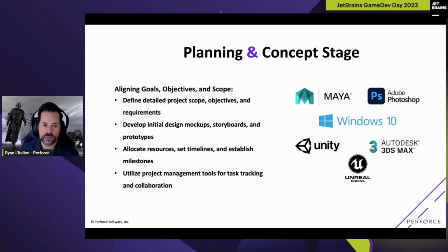planning style. The usual software development tool becomes Atlassian's Jira or Monday or Hansoft, which also has its pros and cons. In the game development pipeline, it's traditionally a waterfall style, where the game design document, the GDD, is referenced continuously, and schedules are planned out with tasks broken down possibly hour to hour, where software usually defines tasks as bugs or features, epics, or mountains. Game development's tasks are usually an asset completion, like adding light to a level, or an asset's material that's finalized. Since video games have a stronger deadline than software, as they need to be packaged, built, and deployed, timelines and task management become paramount.